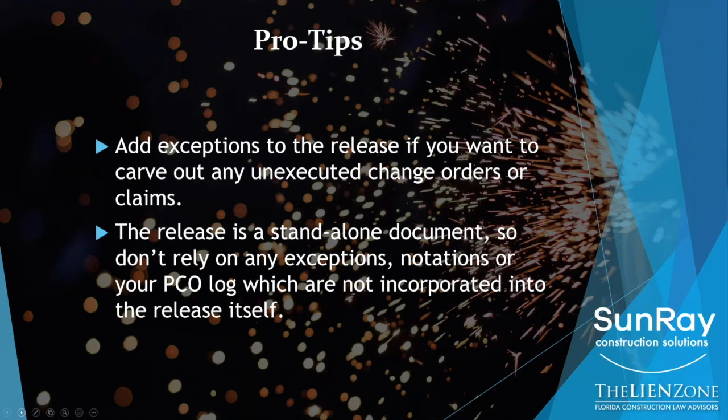If those things that you are hoping are extras or exceptions are not part of the release, that release is a standalone document. So if you sign a release that gives away all your rights through a certain period of time, even if in the package of information you had your PCO log, it's going to be difficult to convince a judge that that PCO log that may have gone with the package is somehow part of your release. If you want to make it part of the release, you have to actually write it in the release yourself.